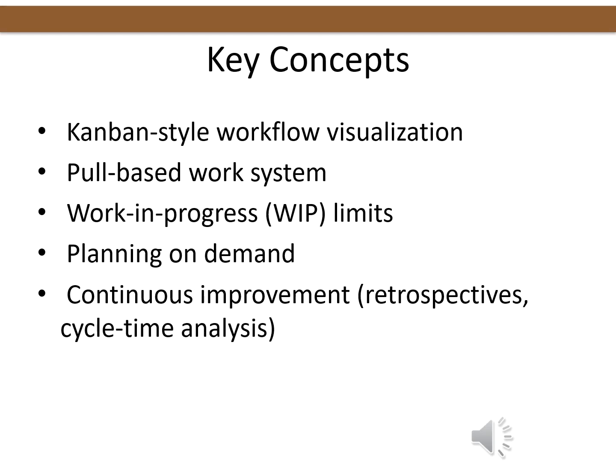On this slide, we're looking at some of the core ideas behind Scrumban. One of the biggest concepts is visualization. Just like Kanban, the entire workflow is displayed on a board so the team can instantly see what's happening. Another key principle is the pull-based system. That means work isn't pushed onto people. Instead, team members pull in new tasks only when they actually have the capacity.